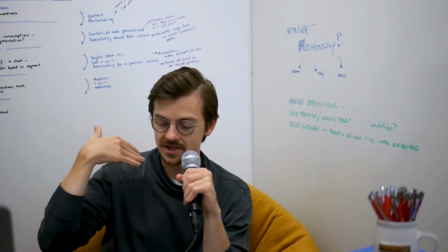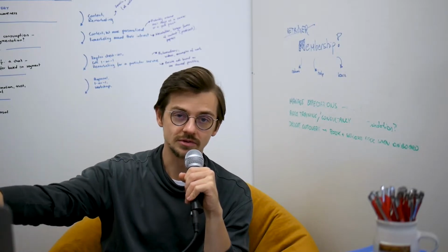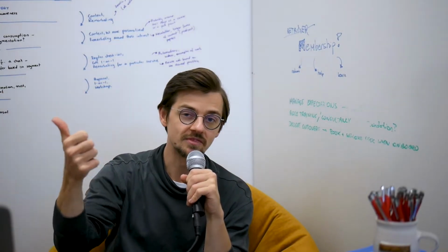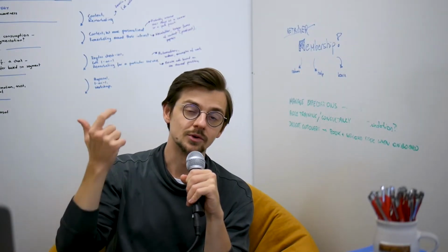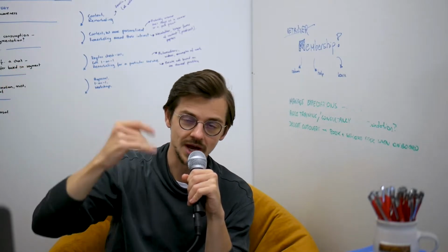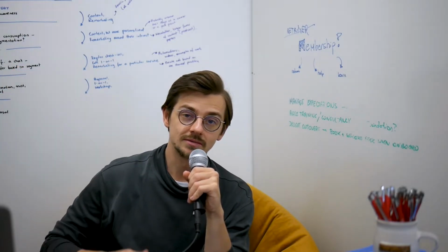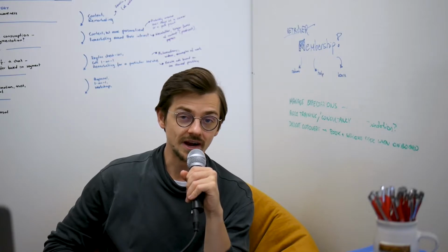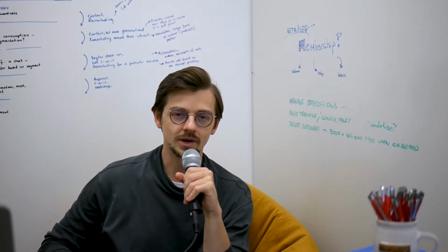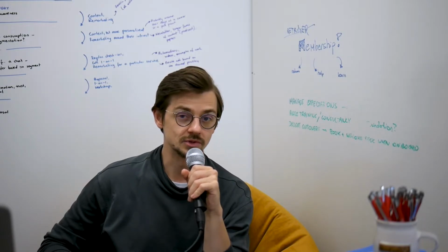When we go through those 5 days, at the end not only do we have a minimum viable website prototype, we also have priority. We know what we have to build. It's there in the prototype. And we also know what's important to you, what's valuable to you as a business owner. So there's the design sprint, where we always have at least one, sometimes two.